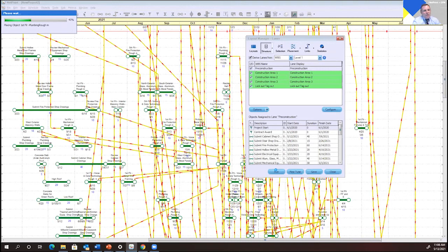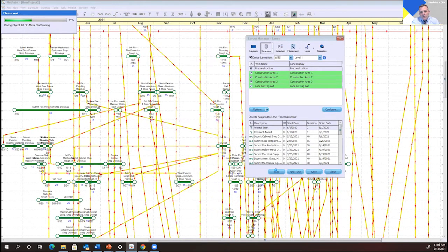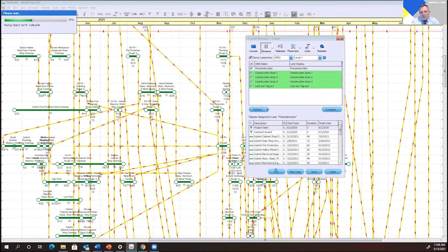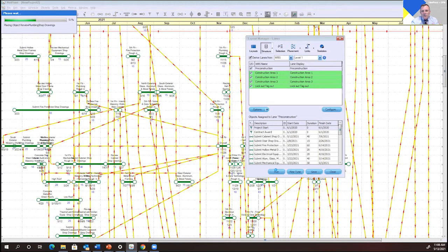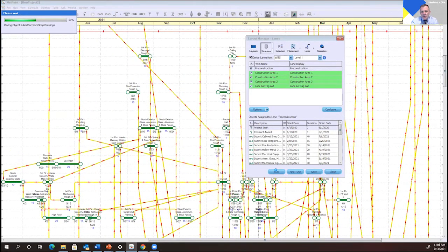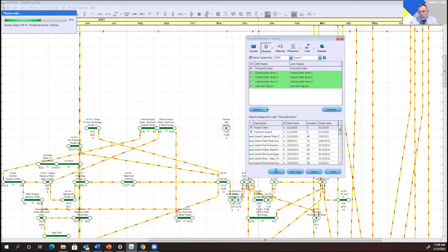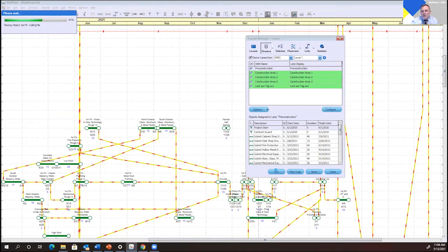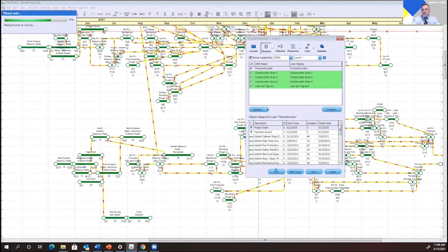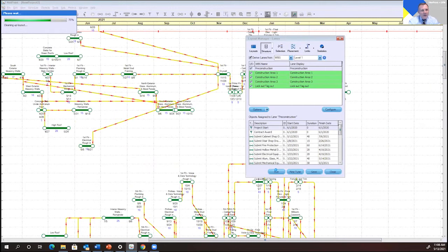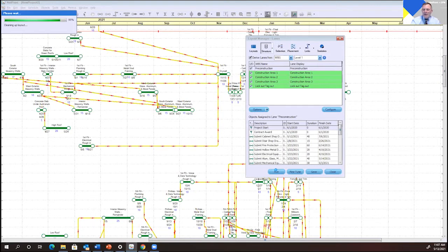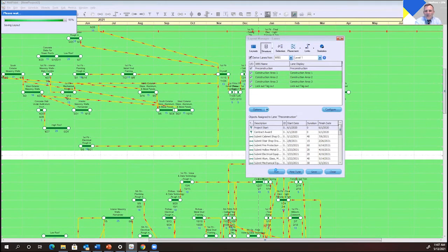So you can also code the schedule. And I've seen elaborate coding systems that get you, for instance, one coding system could say where physically on the job site will the work be performed. And another one could say what trades are involved. And so you can swim lane that directly into the system without having to drag things meticulously one by one, which is actually, in the early days, what we used to do before the development team figured out this now patented, is that right? Patent pending. Okay, well, with our hit ratio, it's almost inevitable it will become patented. Approach to arranging the network.